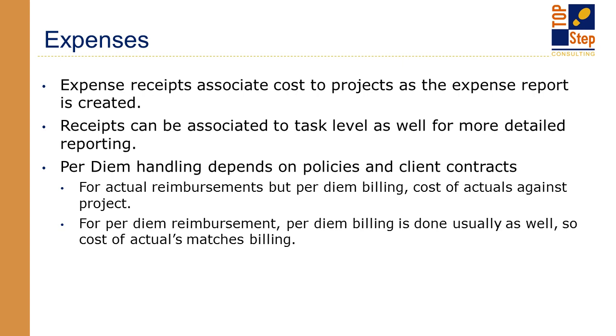And something to remember is that many organizations bill and or pay their expenses per diem. So if you're paying actual reimbursements but billing per diem, the actual reimbursement piece is the expense that hits the project. So you may be losing revenue if you're doing per diem billing back to the customer.